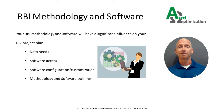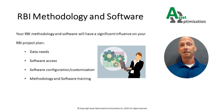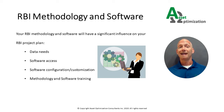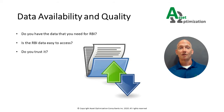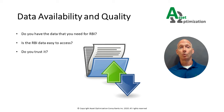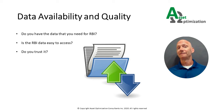Since both the RBI methodology and software will likely be new to your organization, plan for training to be facilitated as close as possible to when the RBI team members will need to use the new knowledge and skills. Once you've defined what data is needed based on your chosen RBI methodology, you should perform a gap analysis to determine what data is available at your facility and the effort needed to gather that missing data.